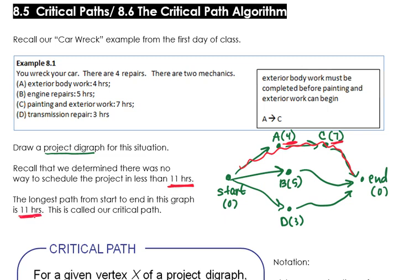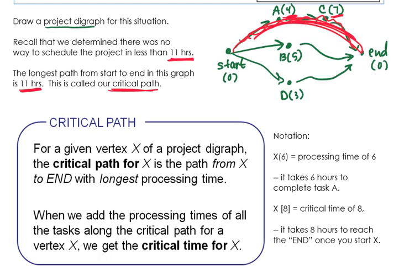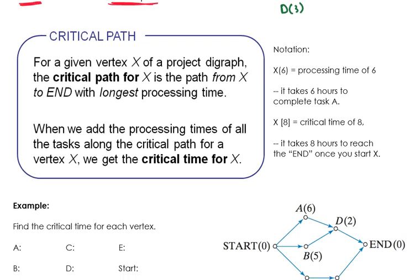The longest path from start to end in your problem is called the critical path. Our critical path is the path from start to A to C to end. That's going to tell us the minimum finish time for this problem. Every project has some point where you cannot go any lower than a certain finish time. It doesn't matter if I have 100 people willing to work on this project — I will not be able to get it done in any less than 11 hours. The critical path for a vertex describes how long it's going to take to get done with the project from that point. For a given vertex X of a project digraph, the critical path for X is the path from X to the end with the longest processing time. When we add the processing times of all the tasks along the critical path, we get the critical time for X.